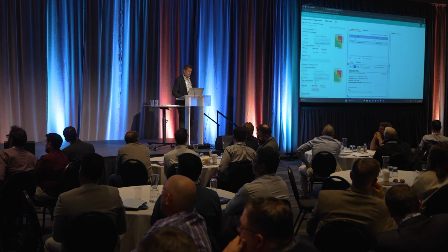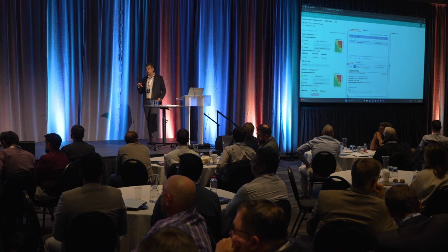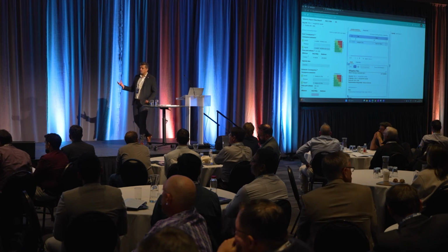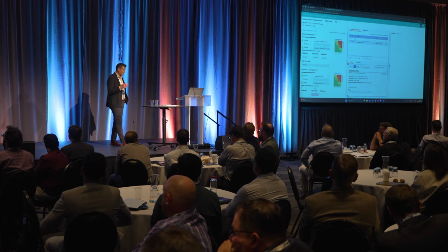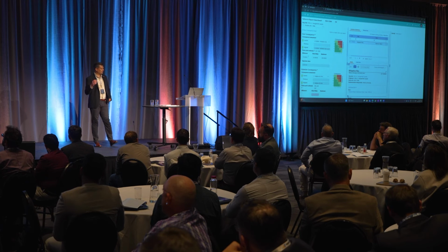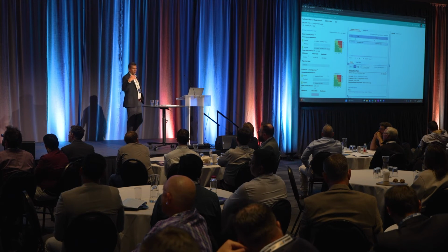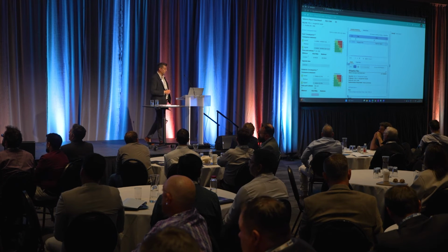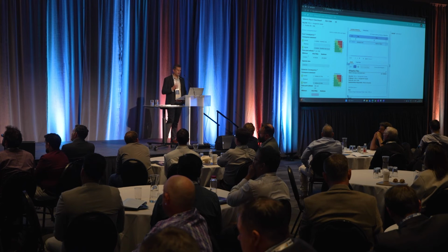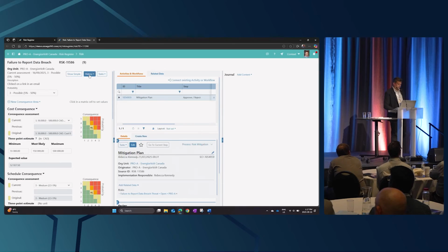For the 3-point estimates, for the cost and the schedule, we're taking the minimum value, the most likely value, and the maximum value. We take 1 times minimum, 4 points most likely, 1 point maximum, divided by 6, and then applying the probability factors to give that calculated response. So again, if you're using that to tie in with your contingency, you can do that. But you guys come here to see AI.